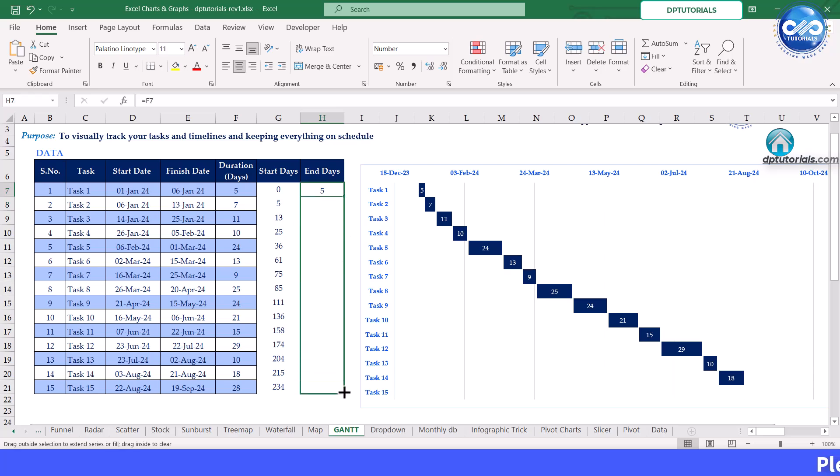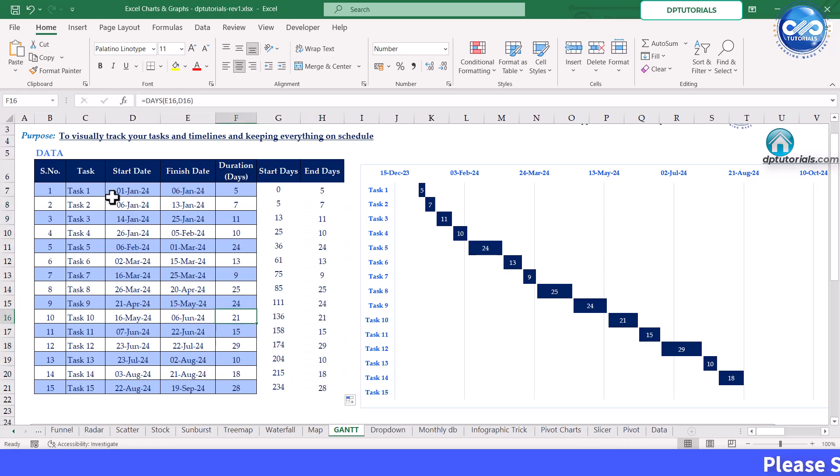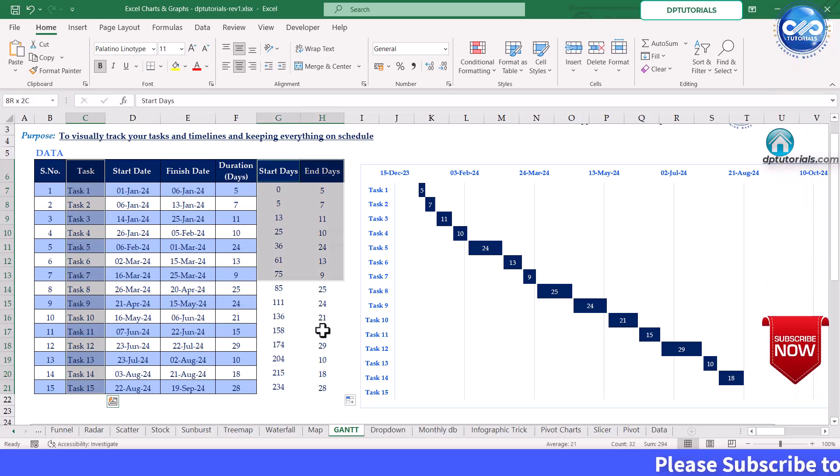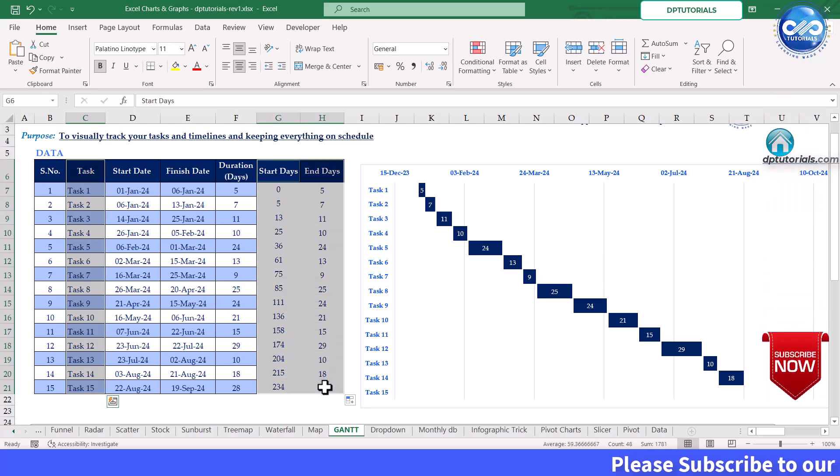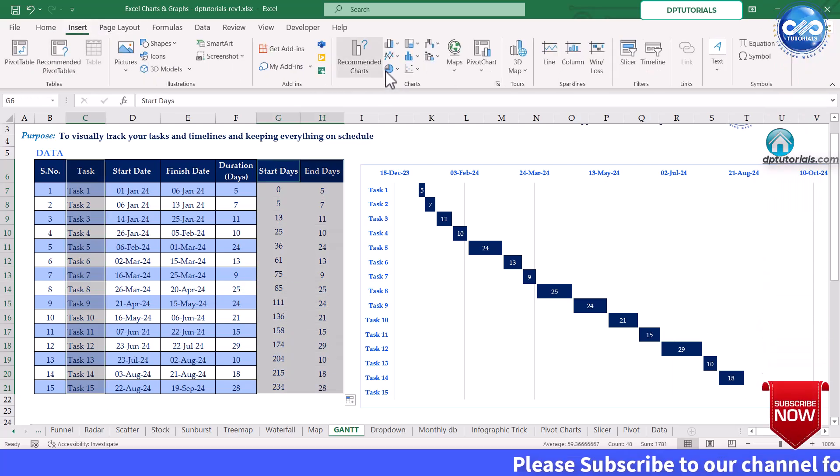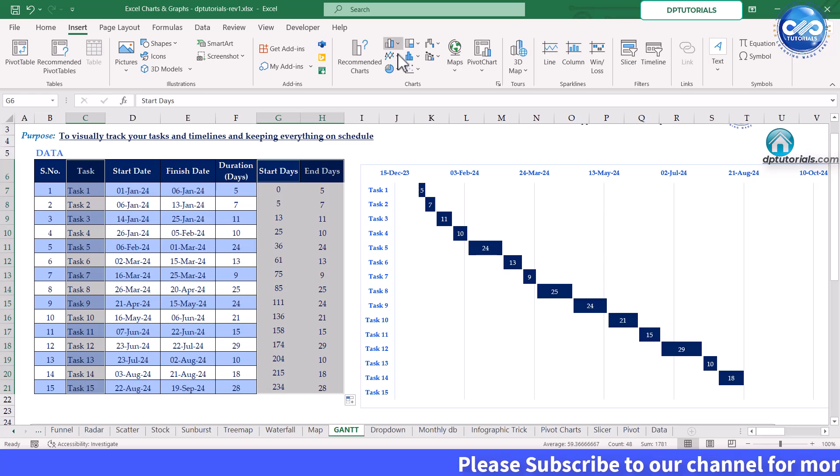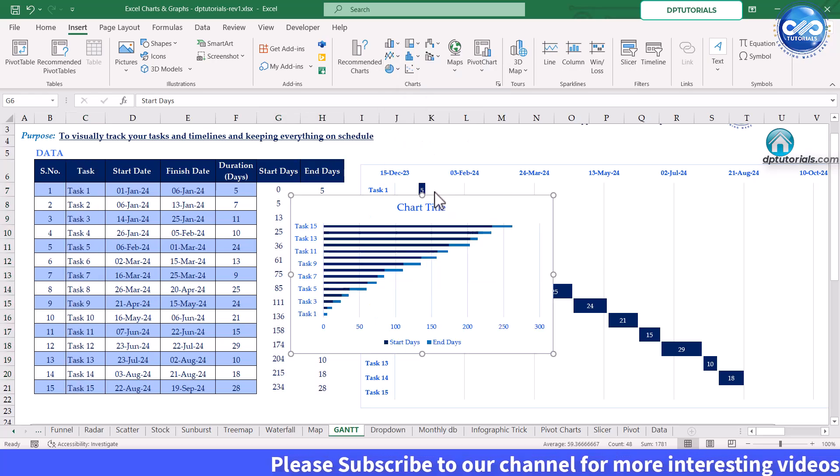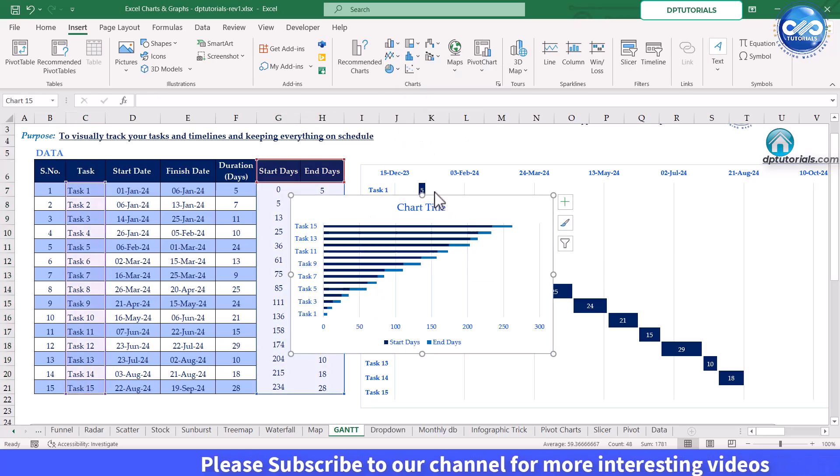Next, select your task column along with the start days and end days columns. Go to insert tab and select stacked bar chart. You will see a basic chart appear, but let's customize it.